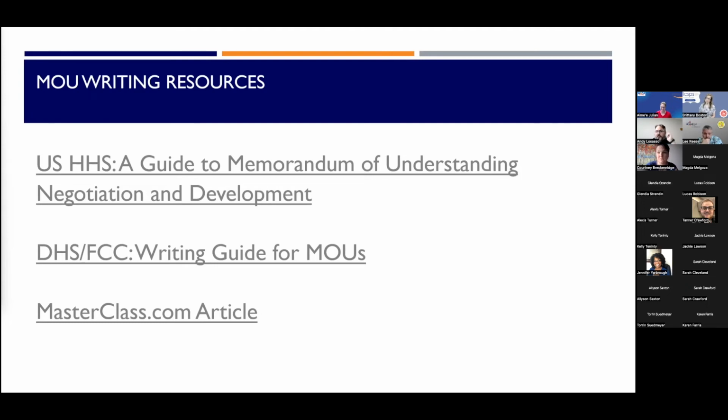I see that we do have a question in the chat from Kina. What happens when deliverables aren't met in the MOU? Well, that depends on how the MOU is written. If you wrote penalties in there and both entities signed off on it, then those penalties would be exercised. If there is no penalty and a deliverable simply wasn't met, if there's no other clauses in the MOU, it doesn't necessarily mean the MOU is invalid or should no longer be used. I think it's an opportunity for both parties to revisit and find out why a deliverable wasn't met, and then maybe amend or append the MOU in a collegial way, so that both parties are still happy and still moving forward with the spirit of the document.